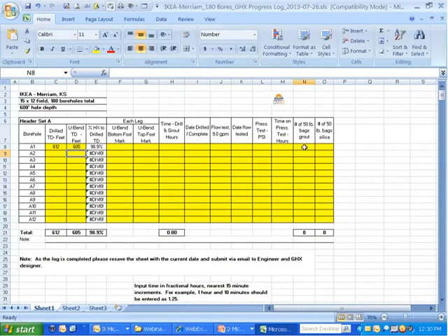The driller, if he puts in whatever, it's also good for him to track his consumption of expendables such as grout and silica, and other items that I think are key to tracking. It also does something else. If the driller's filling out the test data that he's flow tested the system and he's pressure tested it, and the time on the pressure test, he's making a statement that he's been responsible and done that. So if there's ever an issue later, he's saying, well, I tested it, so I'm responsible. So it's kind of a handy thing to use for a lot of perspective here.